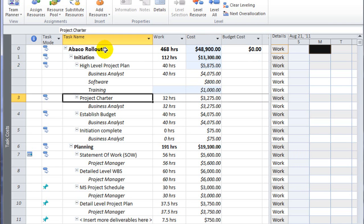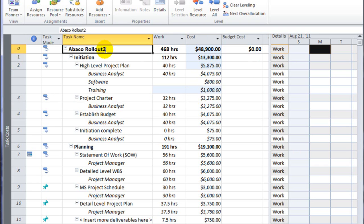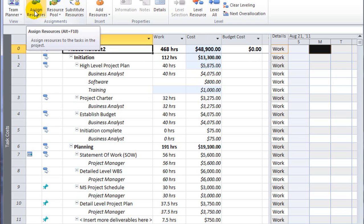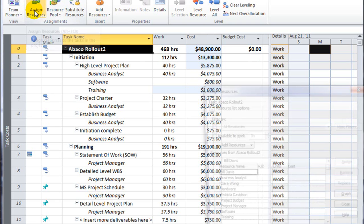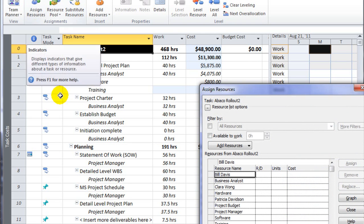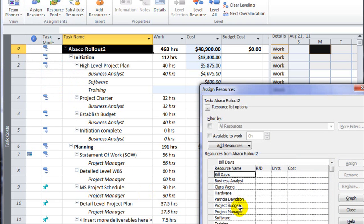There was one cost resource that we added which had the budget field toggled on. A budget cost resource can only be assigned to the top level task in row 0. So I'm going to select row 0, click assign resource, and locate my project budget and click assign.